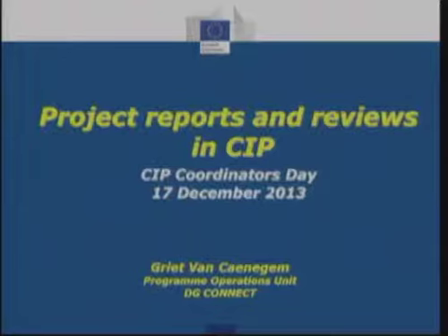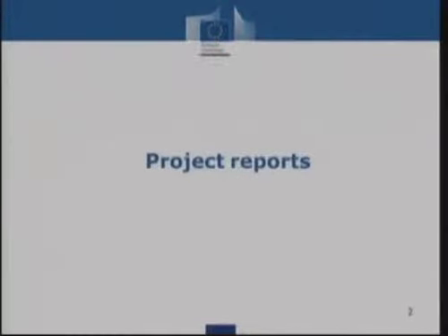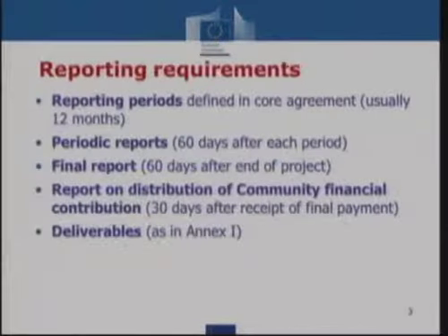And the other table is a table per beneficiary detailing the cost items in the period. I understand that this is a table which is, in fact, a pop-up which comes up in the C forms, asking you for more detailed information on major cost items. So together with the progress report, part of the periodic report is also the financial statement and the financial certificates.